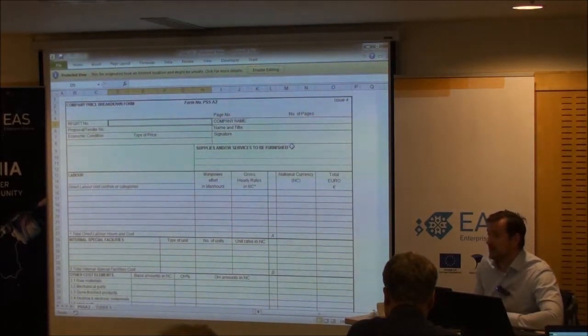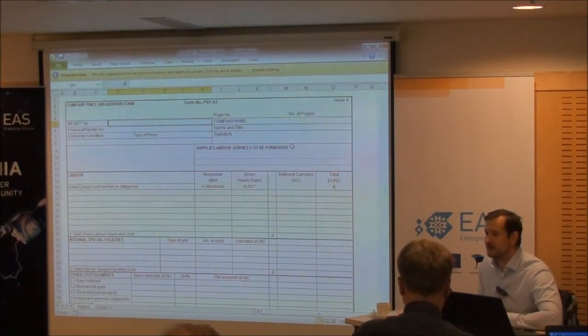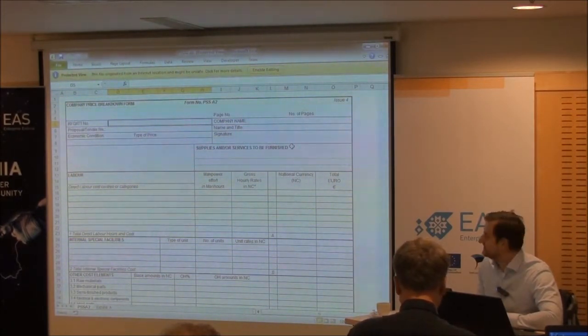They will accept an electronic signature or whatever, that's okay. But you for sure want them signed from your subs, because you want to know that your offer is dependent on them at that price point. And it's much better to have that on a bit of paper signed than to be discussing it later when they want to increase that.